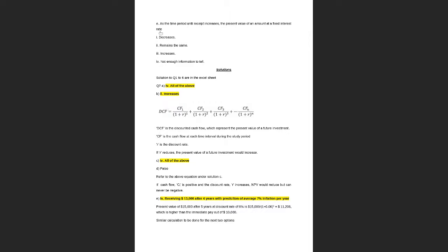So whenever you get questions like this, just look at the equation and try to fix all of this and look at what is the variable. So in this case, n is the variable, and the question is asking if the present value will increase or decrease. So if n decreases, which is in the denominator, then your discounted cash flow will also, wait, this should increase, right? Because you are, oh sorry, you are increasing this, so this should decrease, so inversely proportional. So yeah, your present value will decrease. So any question regarding the MCQs?